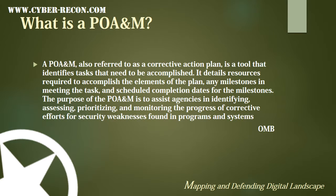It's important to know what exactly a POAM is. A POAM is a Plan of Actions and Milestones for an information system, or even a common control set. According to OMB, a POAM — also referred to as a corrective action plan — is a tool that identifies tasks that need to be accomplished. It details resources required to accomplish the elements of the plan, any milestones in meeting the task, and scheduled completion dates for the milestones. The purpose of the POAM is to assist agencies in identifying, assessing, and prioritizing and monitoring the progress of corrective efforts for security weaknesses found in programs and systems.